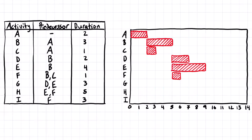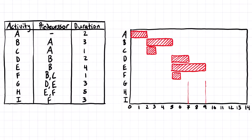When we move on to activity G, it also depends on activity D and E, and it's three days long. So we're going to find out where activity D finishes — it's going to be here at the end of the seventh day — and activity E finishes here at the end of the ninth day. So we can't start until both of those are complete, meaning we have to start after the end of the ninth day, which is also the beginning of the tenth day, and it is three days long.